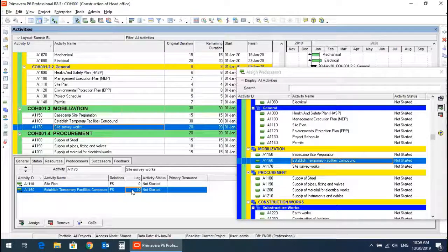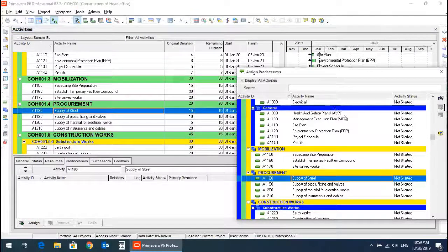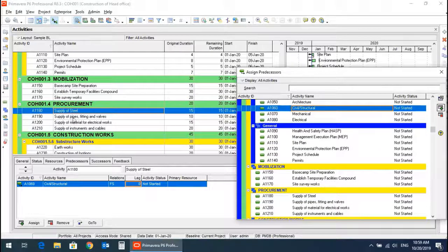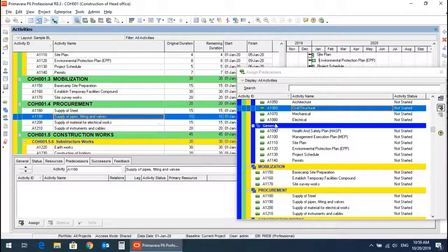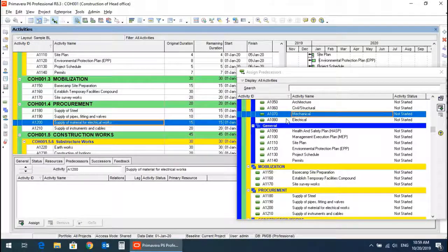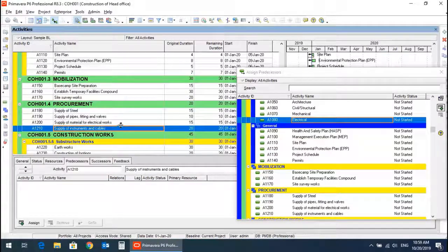Moving to procurement: supply of steel has a predecessor of civil and structural drawings. Mechanical supply of material, electrical supply, instruments and cables also have their respective predecessors defined.